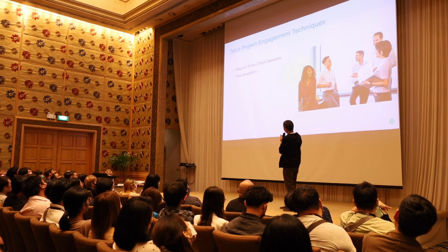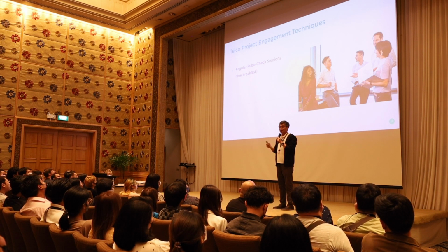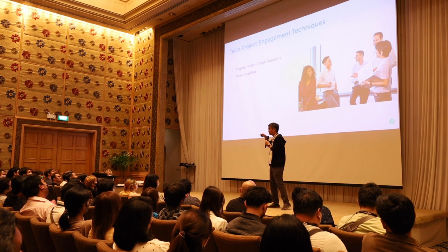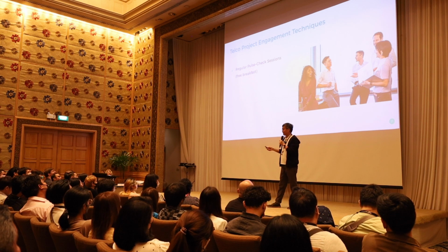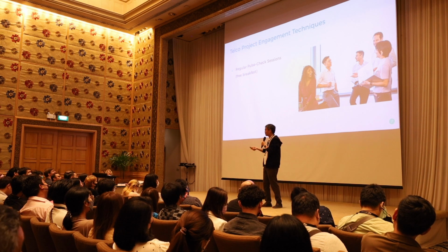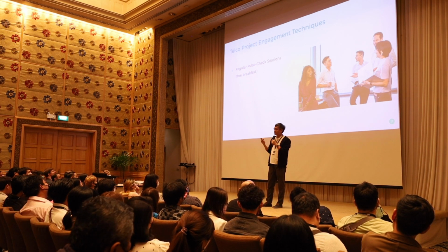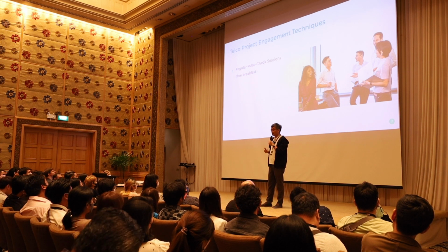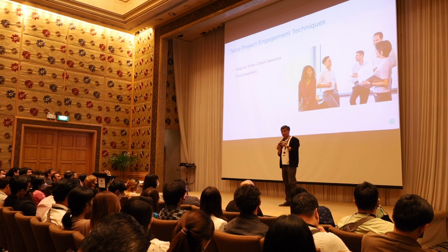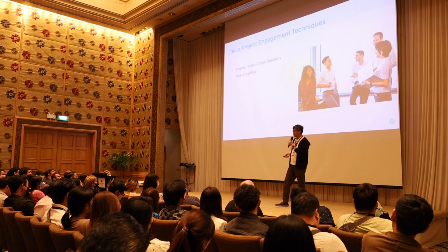One of them was, we had regular pulse check sessions. Basically, because they're all busy during the project, we would hold a 7 to 8 a.m. breakfast. People will go, we will have breakfast together, and then we will ask them a series of questions, informally, conversations, not very formal. We would ask them, how are you guys doing? What do you think needs to be done? What are your concerns? And then we would write this down, and we would make additional activities to address these concerns.